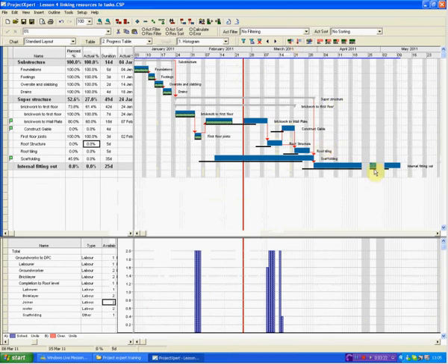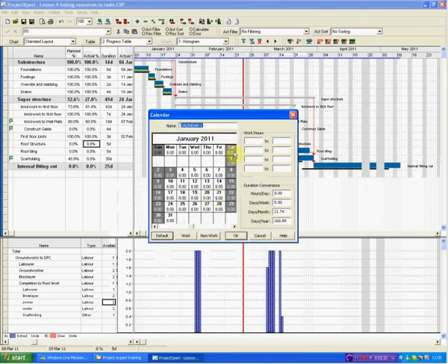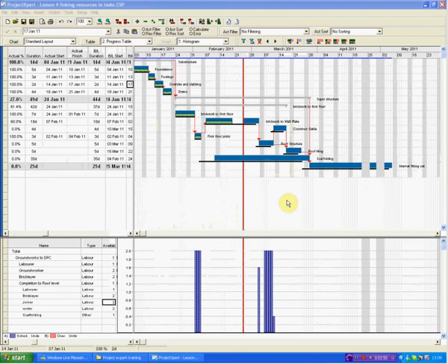Now, as expected, that's now moved that day back a little tiny weeny bit. It also looks like we could do with doing that date there as well, so we'll set the calendar, modify it, go to, and we'll also set that weekend as a working week, and that one, and we'll work that one as well. And that of course is clawing back some of the time that we've lost, so by working the 2 weekends there we can get some of that time back. So that's how you can use your ProjectXpert to plot the progress of how your project is going on.